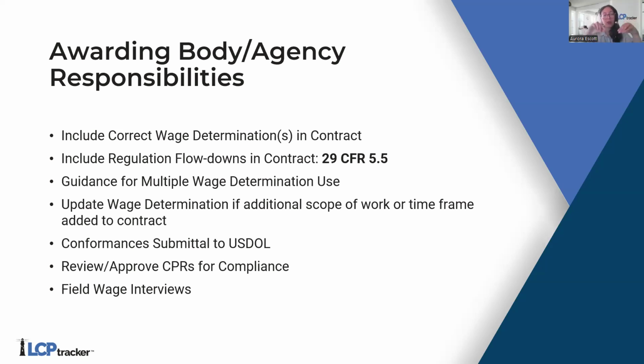Now, awarding bodies are also responsible for guiding you if there are multiple wage determinations for a particular project. Remember how I mentioned you might have a dual funded project that you run into? That's when you would have more than one wage determination.